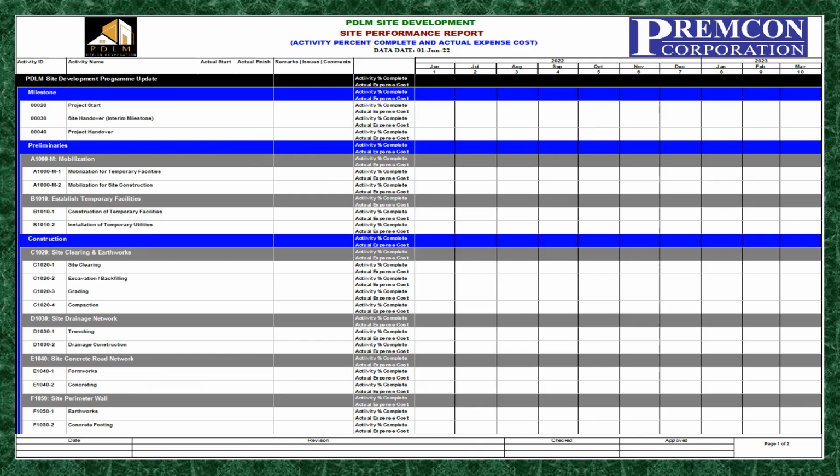Like, for example, for the detailed baseline program, actually, the first submission, there are a lot of comments in there to be rectified. So recording the revisions is really necessary, because before the detailed baseline program is approved, there will be a lot of revisions. Okay. So what else? So we put here 10 months because initially we can finish the project in 10 months.